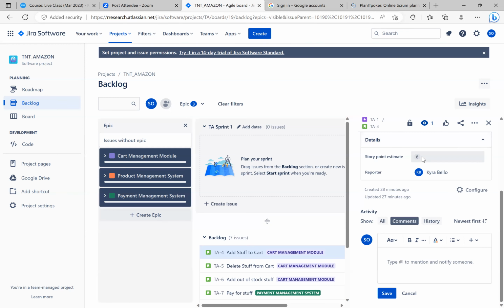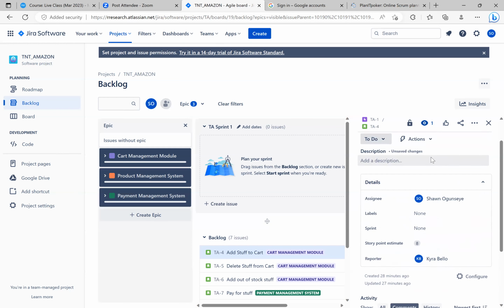Estimate story points. Like I've said, Planning Poker just allows people to choose story points independently. It can also be time, right? If your Planning Poker tool allows you to show different times, people can choose a time, they are voting for a time, and you check what the majority is choosing. If there is so much discrepancy, that may mean some people don't understand the task. And you would now ask them as the Scrum Master.